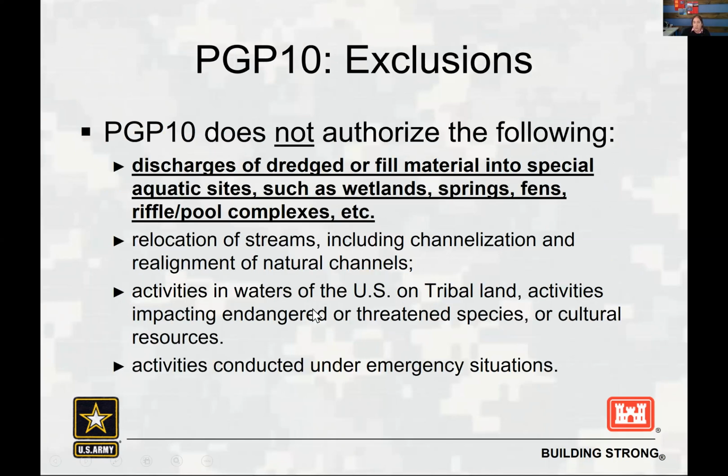There's some exclusions in the general permit number 10. And one of the main things that I think is important to point out is that special aquatic sites are excluded from authorization in this permit. One of the special aquatic sites would be wetlands.